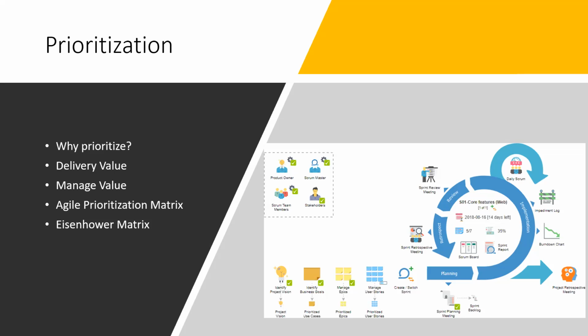They throw some of them back to the product backlog for a future sprint. So you're also doing prioritization here, based on what's important for users and what can be developed by developers in the 2 to 3 week sprint. A sprint can be up to 4 weeks, but usually we go for 2 to 3 weeks, which makes it easy for developers, the product owner and other people to manage with daily scrums. So you're again prioritizing at the start of the sprint, in the sprint planning meeting.